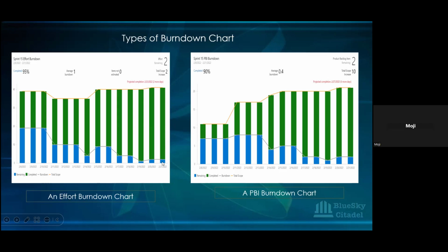Unfortunately, that particular sprint has ended, and your sprint is fixed. So there is no way we can say, oh, because it says we need 2 more days, let's just extend the sprint by 2 more days. It's completed. So whatever is not completed here goes back into your backlog, and then you discuss with your PO if it's a priority, it gets carried over into the next sprint that you're going into.